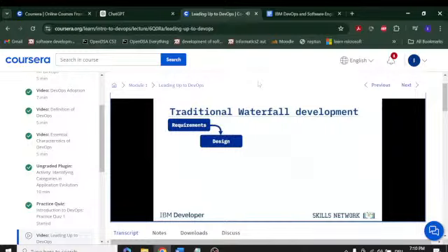In the next phase, we do all the design, and the design is documented in high-level designs, low-level designs, system-level designs, and that phase ends. Those artifacts get passed down to the next phase, and the coding begins, where developers take those low-level designs, the design documents, and write the code that implements those designs. There are entrance and exit criteria to each of the phases. So all along, we're coding in isolation. We're not integrating my module with the next person's module.